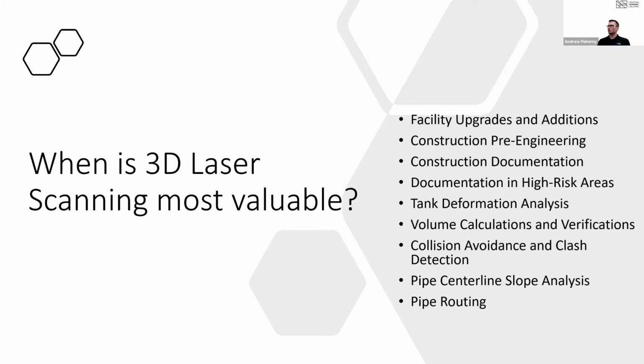And that's a very valuable tool down the road. Say a couple years later, something comes up and they say, "Hey, how can you prove that you actually built it the way you said?" And now they can fall back on the scan data and say, "Here it is, here's what we built exactly as it was, and you got what you got." So also, documentation in high-risk areas is a valuable tool with laser scanning.